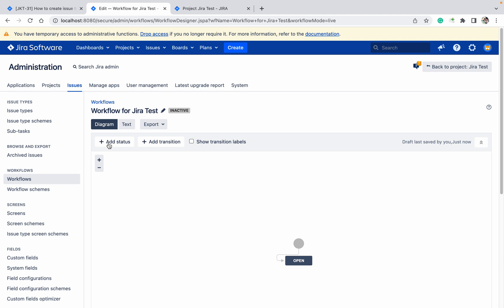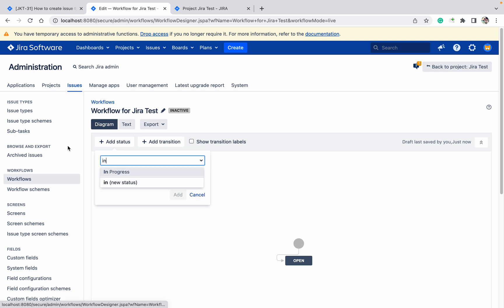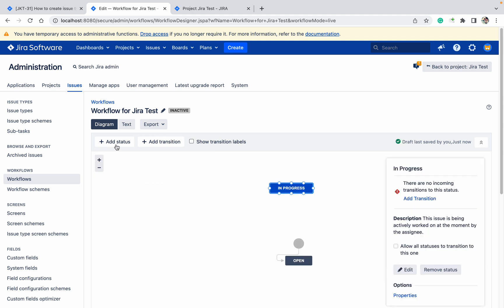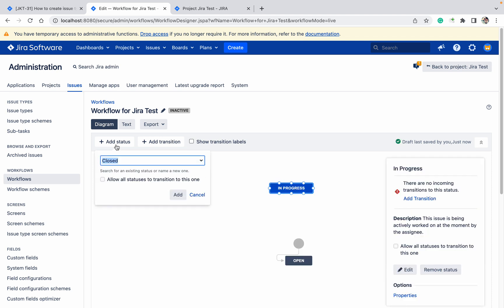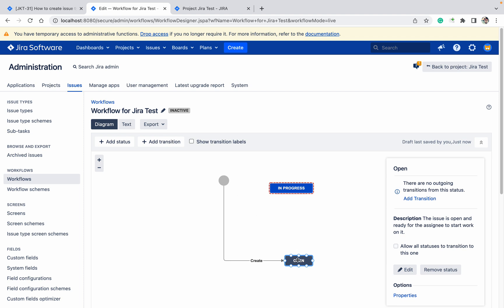To add another status, click Add and select 'In Progress'. Click 'Allow all transitions', which means you can go to In Progress from any status available in your project. Then add the 'Closed' status as well. Now I have these three statuses created.